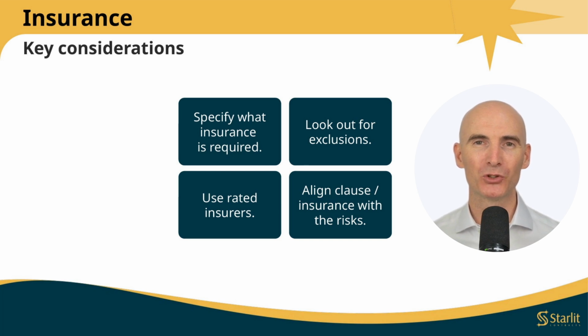First, an insurance clause should spell out what insurance cover is needed, and our sample clause doesn't. Don't leave it to chance. If you want the other party to have professional indemnity insurance, then mention that explicitly in the contract.